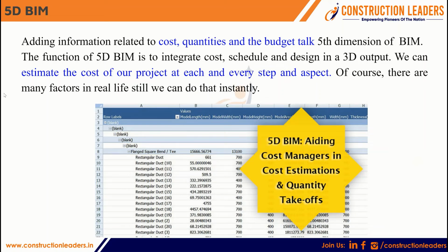5D BIM. Whenever we add information related to the cost to the 3D model, then we can call it a 5D BIM model. We can take the quantity takeoff, and we can estimate the project based upon the 3D model very easily by using 5D BIM.